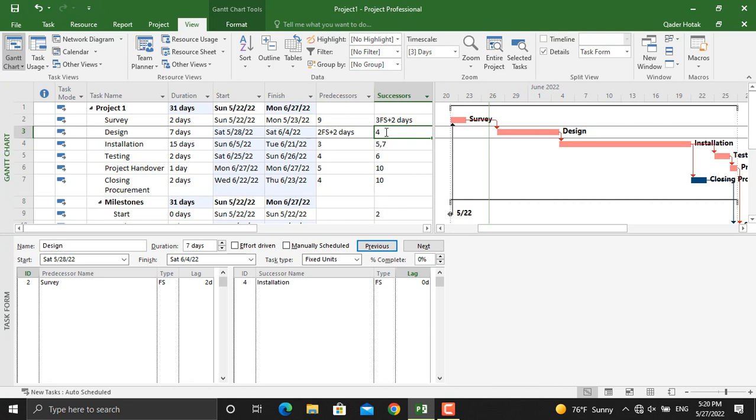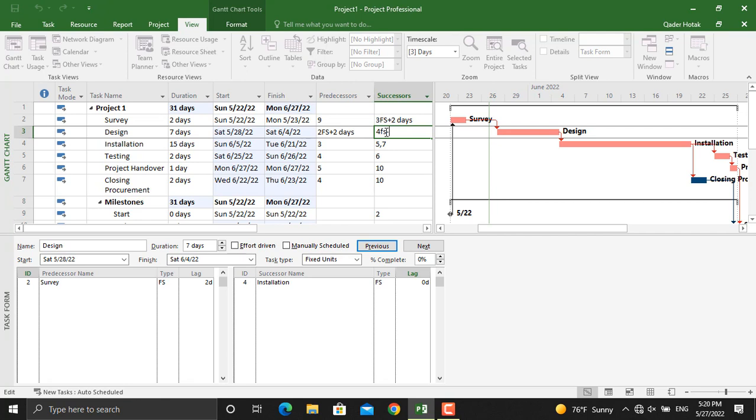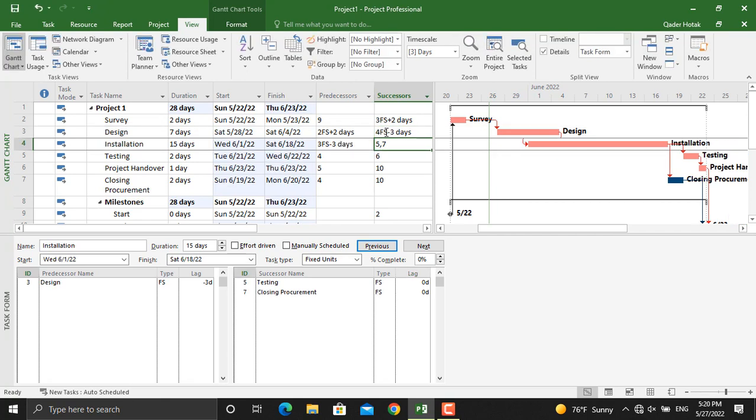You can do it in here or in here. For example, in here I will click and I will write down finish to start minus, for example I want to lead that activity by three days. I will write down three and press enter, and as you can see the installation came backward by three days. So this is how you add leads and lag to the activities of your project schedule.